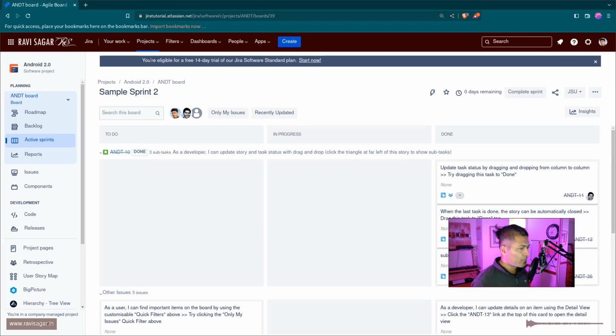For example, let us say you have a big project to manage where you have different epics or stories or tasks or subtasks, and maybe for some reason there is a split and you need to move some of those epics and related stories to another project. You can do that. It is very simple. All you need to do is, of course, first create that target project. Make sure you have all the necessary configuration, like all the states and workflows, and then move those issues. So you can do a bulk move.